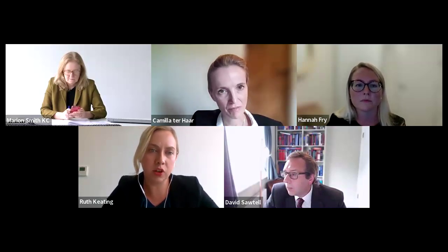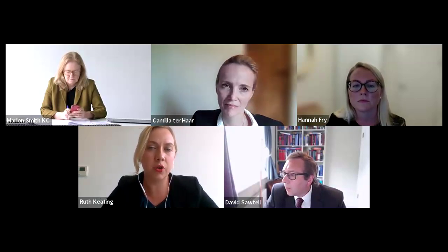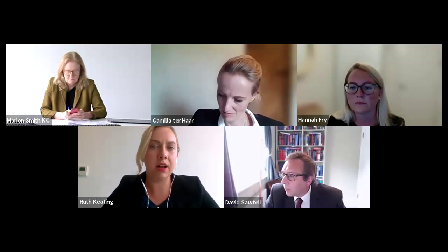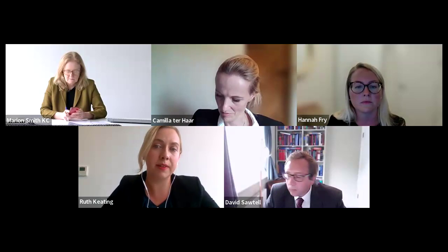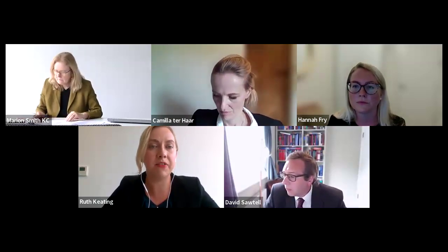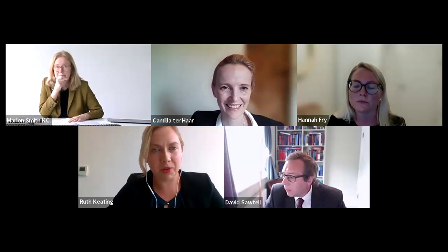So if one looks at the 2024 edition, it now limits the contractor's liability in relation to design to no greater than the use of reasonable care and skill. And so the headline point is that unless you're required by statute, the contractor will have no liability for any design to be fit for purpose. Now, Marion, you foreshadowed what that was about.